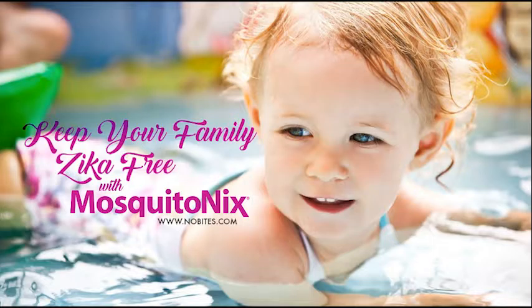And I do think another thing that we just did at the model home a month or so ago, is other things that they can incorporate their designer in, is an electrical walkthrough. We did that because we had done an initial view on the floor plan. Steve and I did, and marked where we wanted things. Went out there and went, wait a minute, why? There's not supposed to be a sconce there. So it's important to go and make site visits, and do it with your project manager and maybe even the designer. Absolutely. We'll pick up on that when we get back from the break.